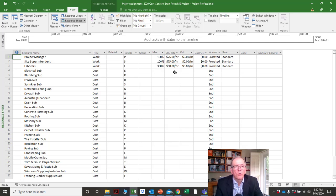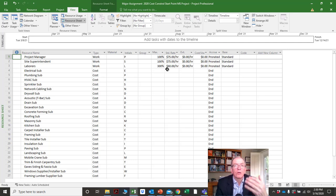If we're doing resources with work — meaning we self-perform the work or maybe for admin staff — we would load those resources onto the resource sheet and apply costs, like the burdened hourly rate of these particular people. Burdened means it includes all costs.